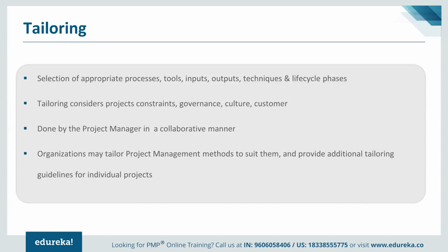What kind of governance do you need really? I have seen sometimes the project is a high performing project. So there is a lot of attention given to such a project, wherein if there is any project which is strategically linked to the organization's objective, then that project gets a lot of attention. If that is the case, then probably you need to have a separate governance altogether. You can't really have just a governance call for the sake of it once in a fortnight or once in a month. Probably you need to have such governance calls every week. And you need to also think about how you are going to report the progress of such a project to the senior management, what kind of dashboard you should be using, etc.